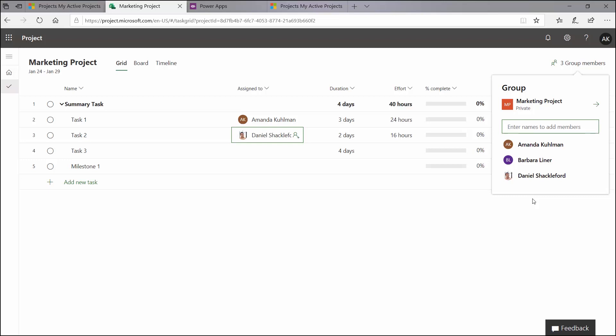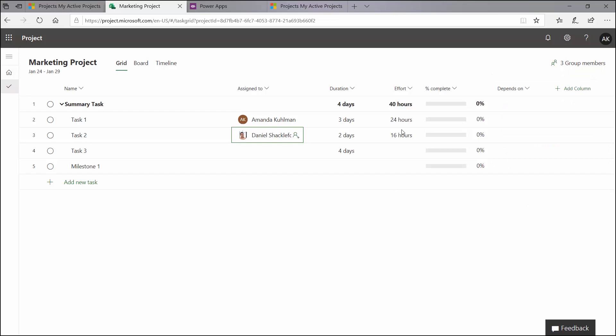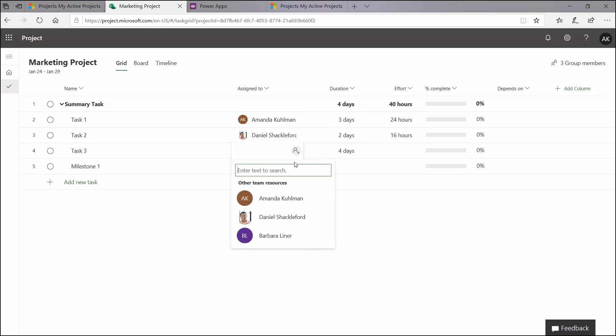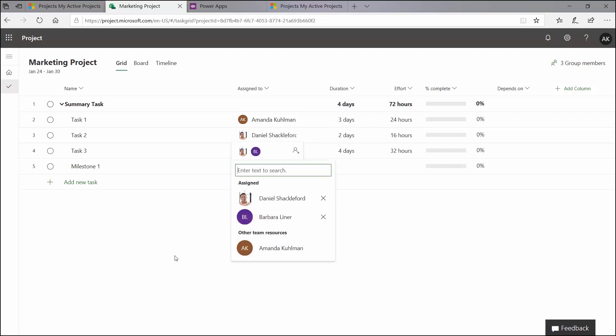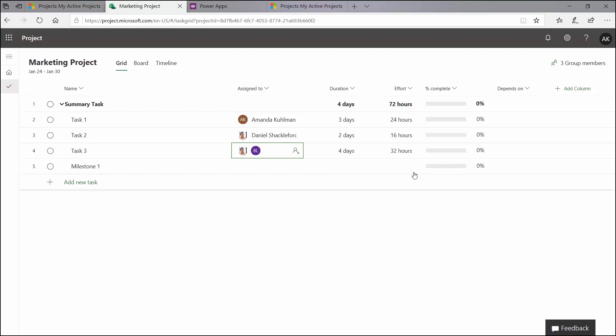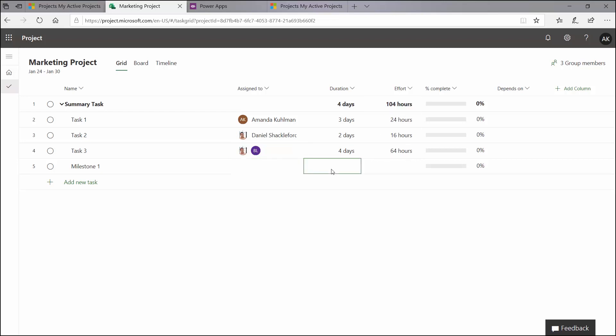Everybody who does have access to the schedule will come, and they will be able to see the same view that I see here. So whether I'm Daniel or I'm Barbara, if I come into this project, I will see this same view, all of the tasks and all of the data points about them. So I'm going to add a couple of different resources here to my task number three. And you can see it does do some math and calculate out some dates there for me and some effort. And then for my milestone, of course, we have a zero-day duration for that.